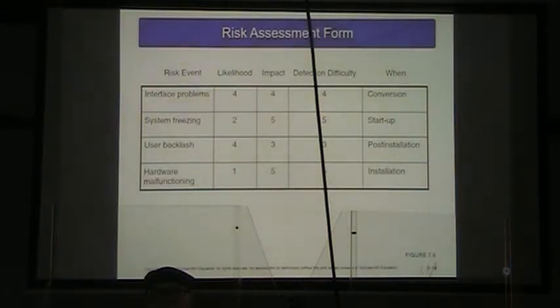Hardware malfunctioning, likelihood is a 1. They are expecting the hardware to pretty much be reliable. The impact, though, would be a 5, and detection difficulty would be a 5. We would see that during installation.